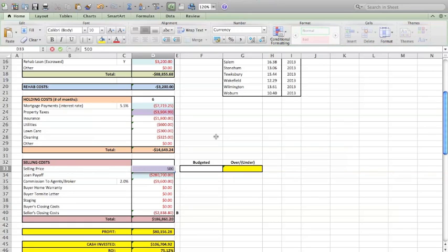So I'd update this to $500,000, but I want to keep my budget selling price here because I always like to see how I estimated the rehab or the ARV compared to what the ARV is at the end of the project. And that really shows me if I'm being conservative or if I need to be more conservative when I'm estimating ARVs.